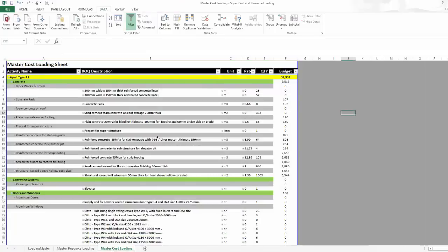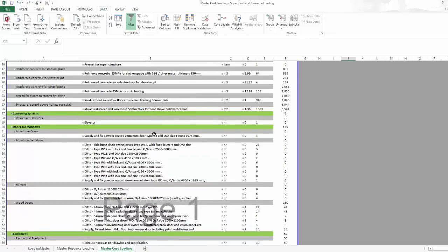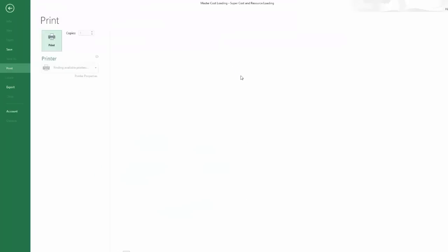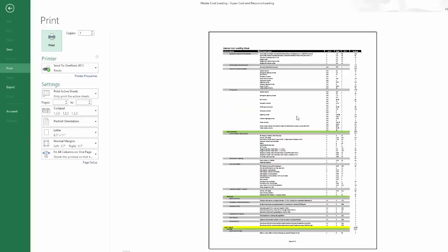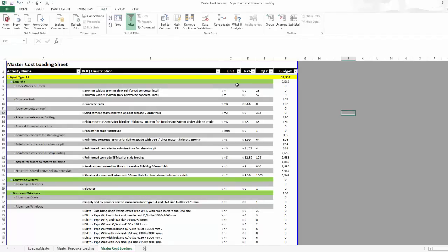Additionally, I have here the cost loading ready for me — the activity name, BOQ description, unit, rate, quantity, and budget. So in very few steps I created cost loading and resource loading ready to be exported to Primavera. You can even print this — it is ready for print in an organized format.